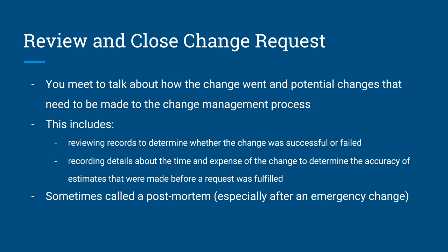After it's deployed, the people involved get together and review it. They talk about the changes and maybe what needs to happen in the change management process. This includes reviewing records to determine whether the change was successful or failed, recording details about the time and expense of the change to determine the accuracy of estimates that were made before a request was fulfilled. Sometimes this is referred to as a post-mortem.